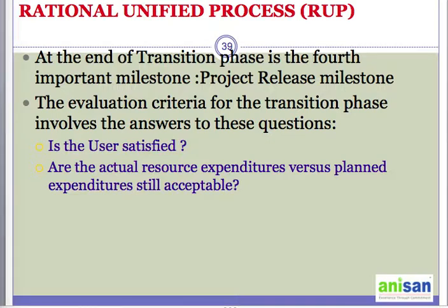Then achieving stakeholder concurrence is important, basically that the development baselines are complete and consistent with the evaluation criteria of the vision document. So when a stakeholder agrees that the solution has reached its minimum requirement, they can provide the sign off. Usually in this project there is some documentation. Post project, we need to close the documentation and get the user feedback, and that we are required to submit.